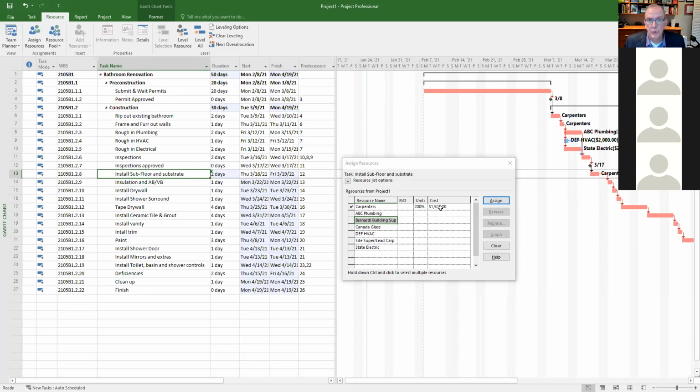Instead of 2 people 3 days. So that's different as well. So just keep that in mind, that when you adjust things, if you go back to something and you change the units on something, this program is going to adjust it assuming that you want it to be calculated for that.